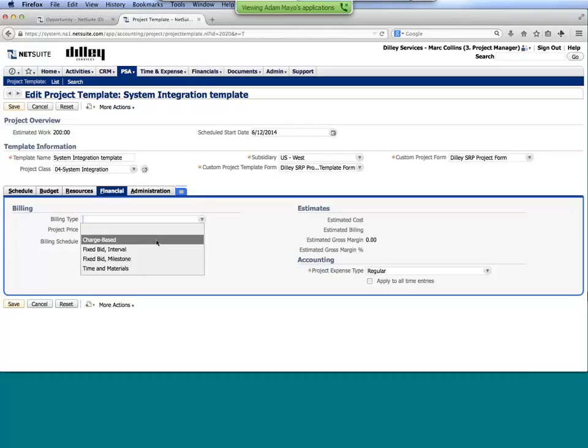And we also have a powerful rules engine, what we refer to as charge-based, where you might have a mixed billing use case where part of the project I'm billing out at a fixed price, maybe another part of it I'm billing out time and materials. And so being able to use a charge-based mechanism with rules to identify that. And so again, we'll get more into those details.